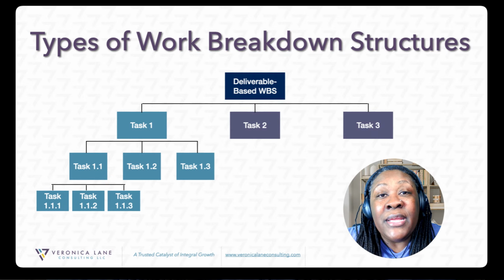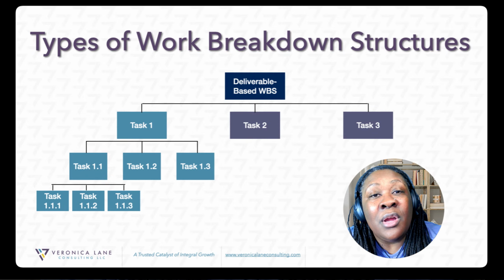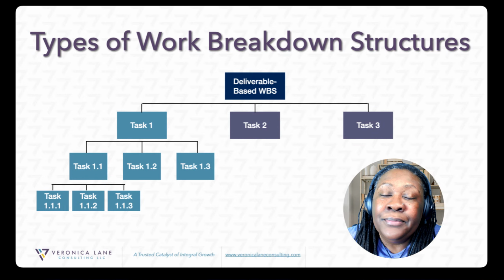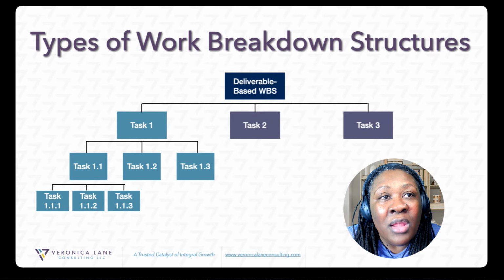We might also need to work through what our fingerprinting process looks like. So then we are going to say this is our task one, and then what lives underneath it, that's our task 1.1, 1.2, 1.3. Then we might ask our teams, all right, team, what are the things that have to take place under task 1.1? And then we list all of these out.